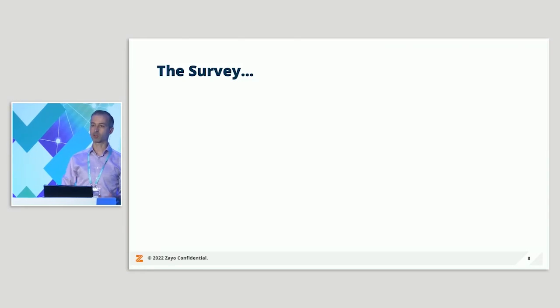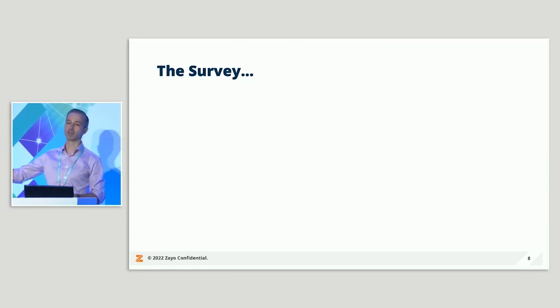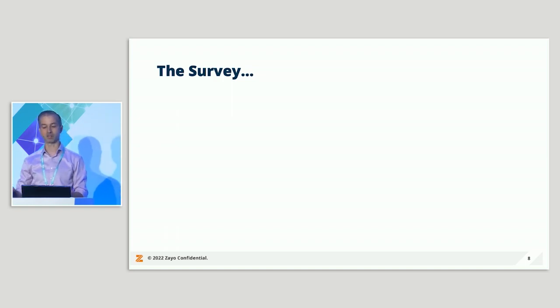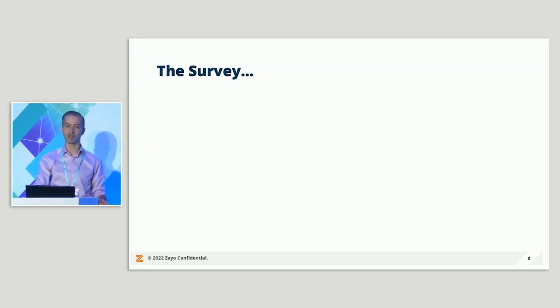So the planning all went well. Now everything is planned, we've got all the contractors involved, and now we get to the actual survey. Before the cable can be laid along the seabed, the ship has got to go out and survey the seabed itself. They survey quite a wide trench from end to end, from land to land, in very minute detail, so you can know what's down there, what obstacles are in the way, what pipes are in the way, other cables, other unknown things.